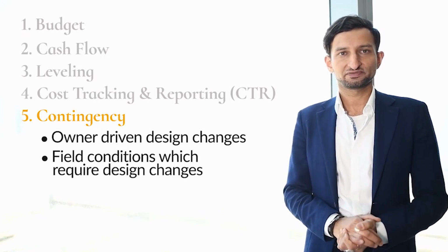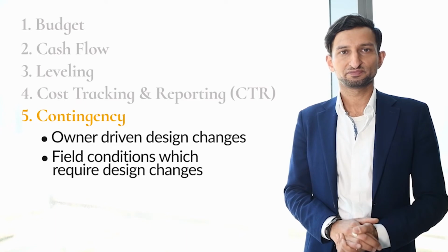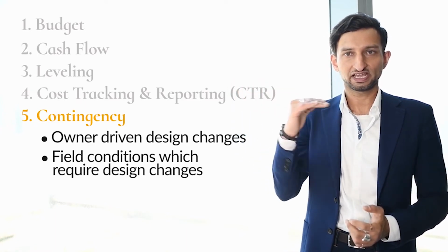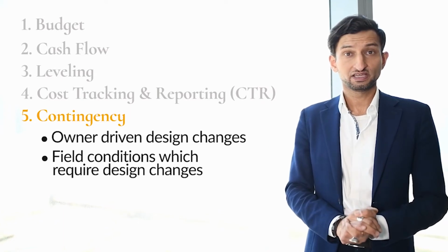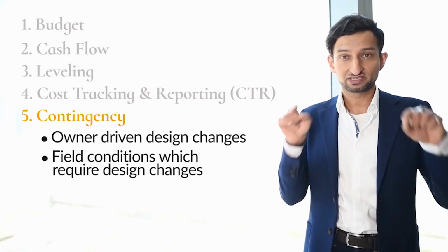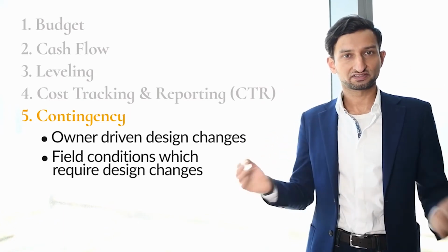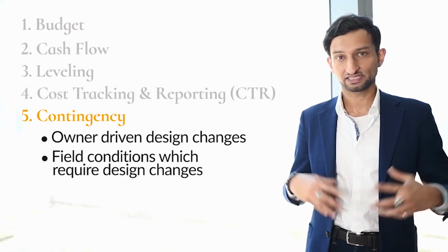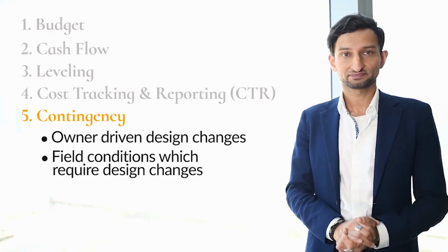In another project I recently executed, we discovered a steel beam meant to support a stair was actually bowed downwards. We only discovered it after the beam was exposed, because it was initially encased in concrete. So the solution required additional steel bracing for the beam, necessitating additional costs in both labor and material.